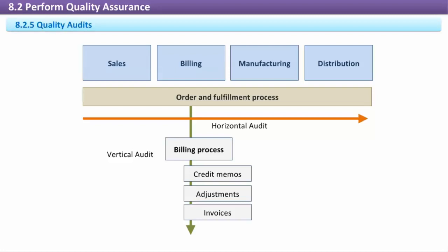But in organizations without a quality department or people formally trained in quality management, the project management team will need to fill this role. While this destroys the independent nature of an audit, it's much better for this process to be performed as objectively as possible by the project management team than for it not to be performed at all.